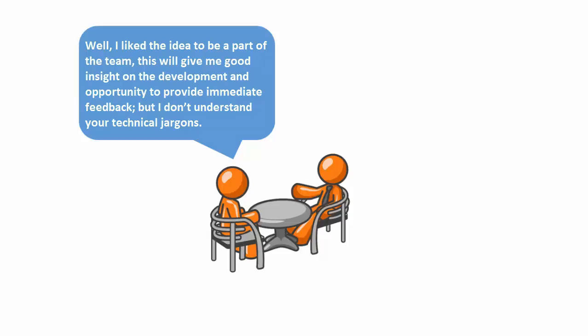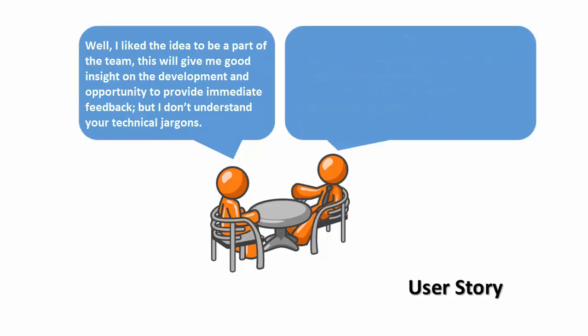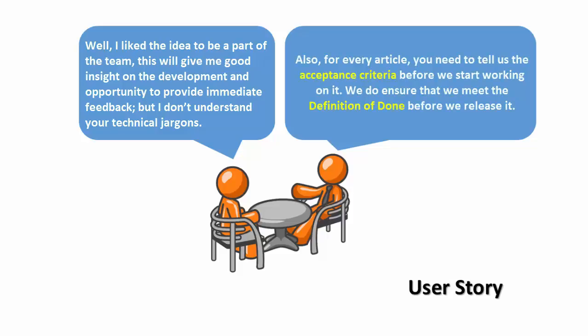But I don't understand your technical jargons. That should not be a problem. You need to tell us three things about every requirement. First, the type of user — who is the intended end user. Second, the requirement detail — what exactly are you looking for. Third, the purpose — why is it needed. This is called the user story format. Also, for every article, you need to tell us the acceptance criteria before we start working on it.